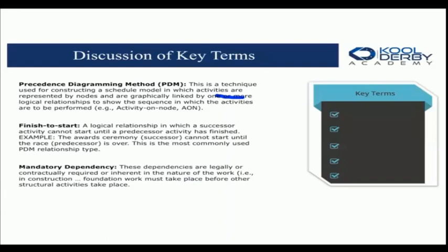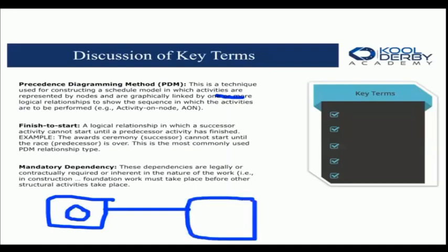Okay, so order equipment is an activity. You cannot install the equipment until you get it, right? So you order it and then install. So a mandatory requirement or activity is ordering the equipment.